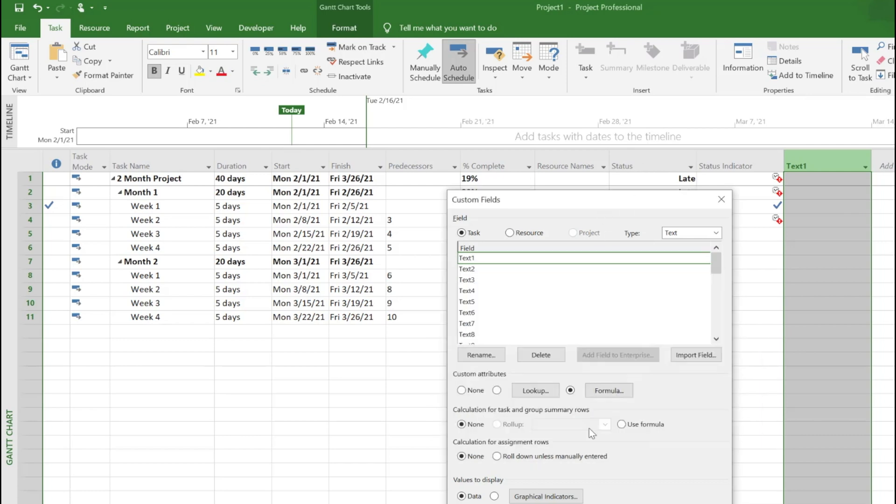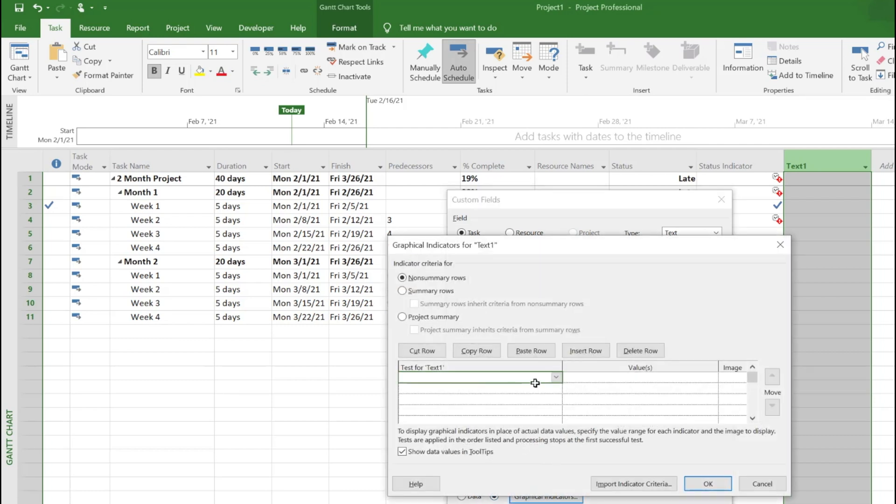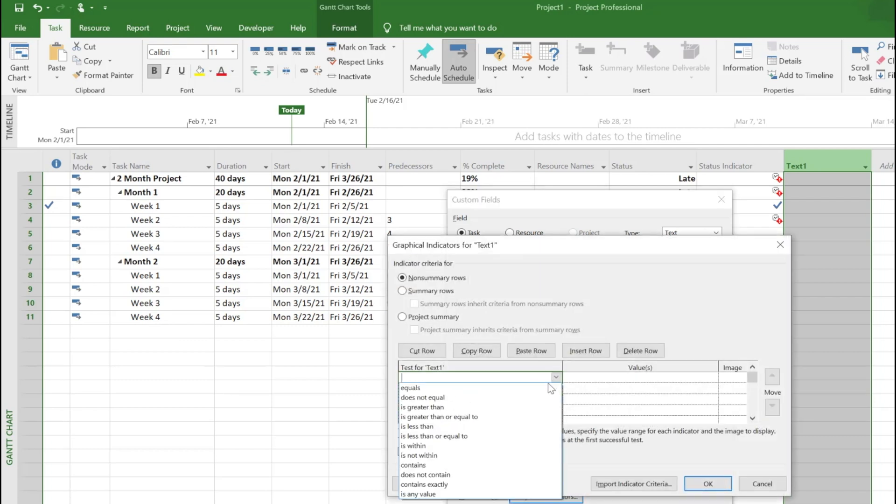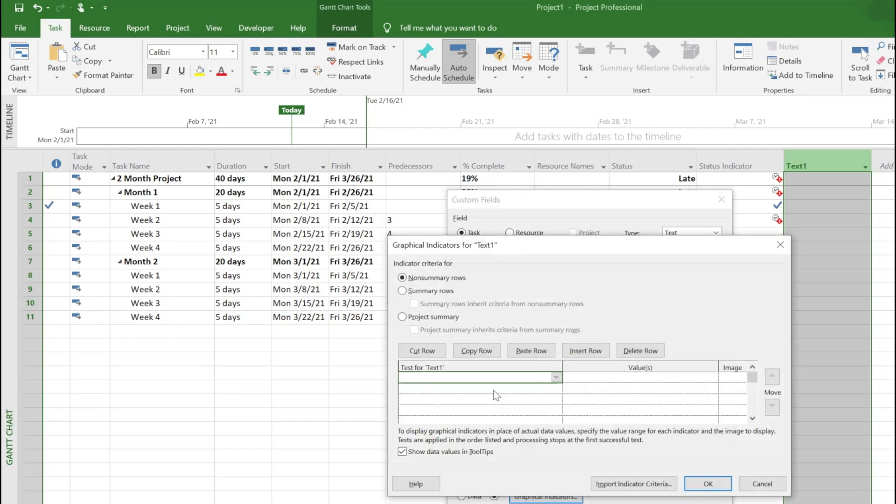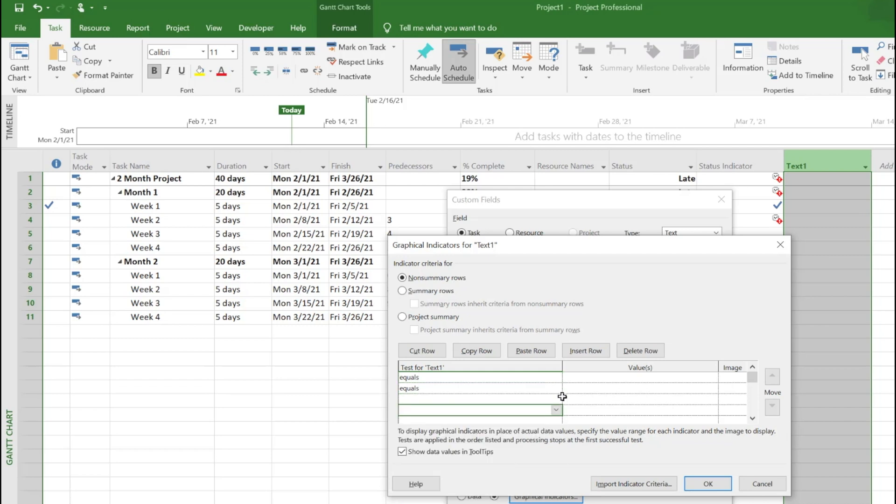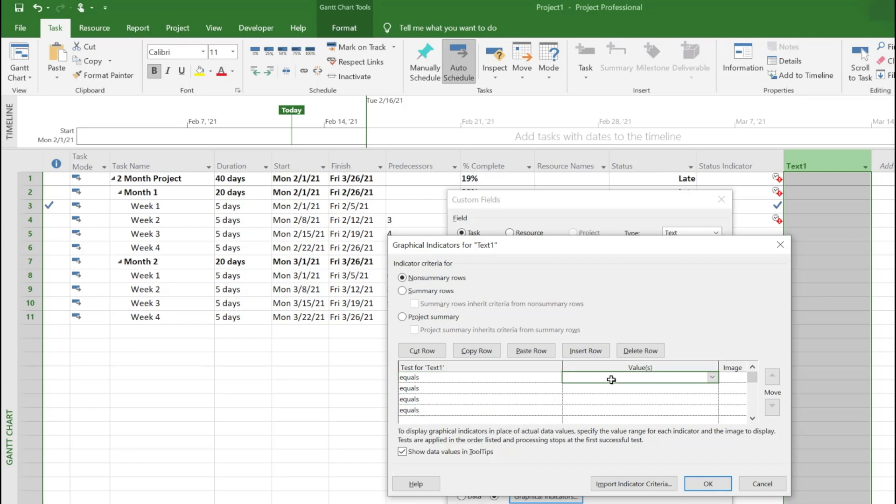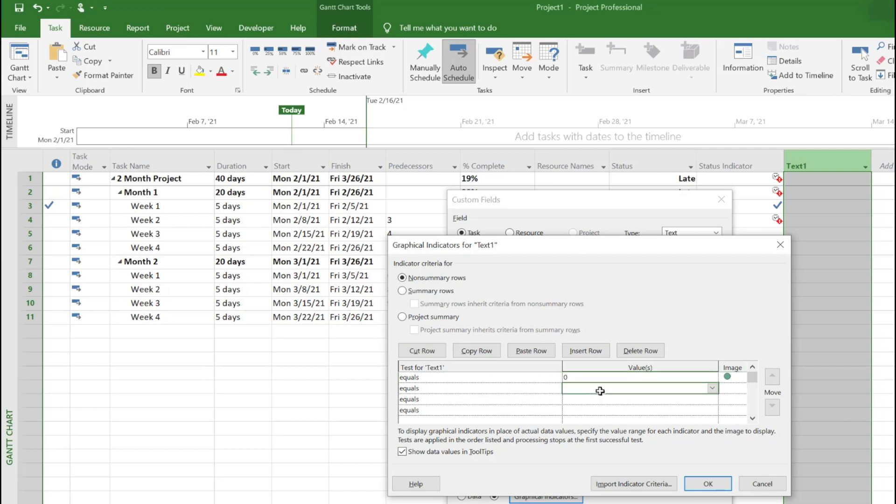In text one, all we're saying is get the status column as text so we can use a graphical indicator. I'll explain what zero, one, two, and three means. If it's zero, that means it's complete, so we want green.